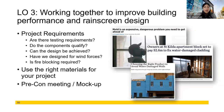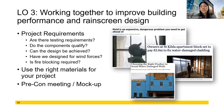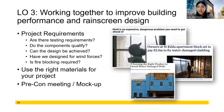Same question applies with sequencing — are the windows going in first or is the facade going first? What does that detail look like? The thing I want to point out is the pre-cut meeting or mock-up. Have them. But please don't call out flat walls for your mock-ups — call out whatever the trickiest possible detail is. If there's something funky going on at the window jamb, or some weird transition between two cladding materials, or something bizarre at the parapet, choose that detail. Let's build that as the field-built mock-up, because if they can nail that detail in a field-built condition, the flat wall is not going to be the issue.